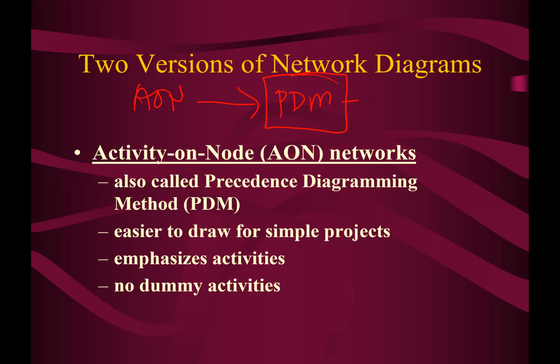The PDM diagram is the one that computer software like MS Project, Primavera and many others are based on. So nowadays Microsoft Project is basically using the PDM diagram. You must understand those things. There are no dummy activities.